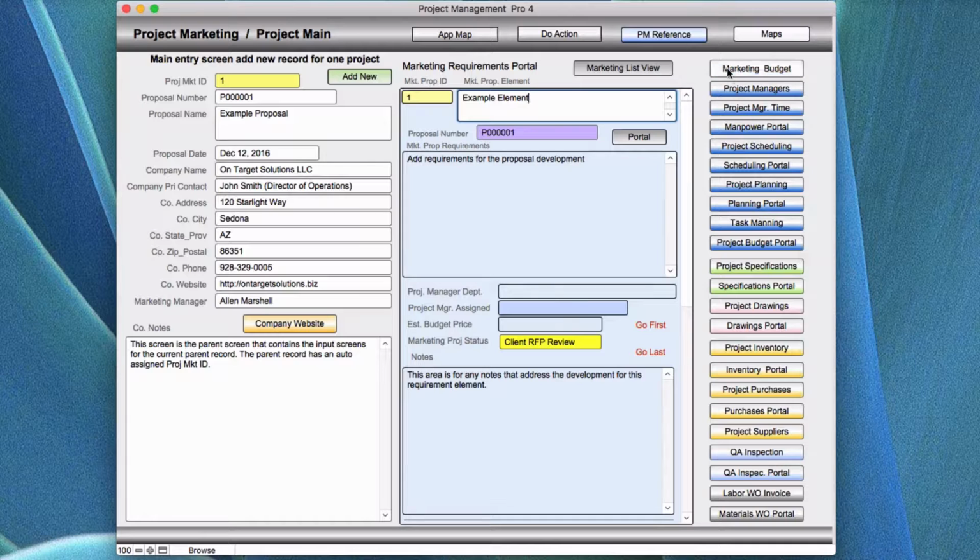Before you can actually start a marketing bid or do anything like that, you need to outline and get all the initial information required in order to be qualified to do the actual job. Many times what happens in a request for a quote is that people read through the entire document and they don't outline it. They do not take the information out of it and address each cost element or deliverable and how they have to provide that information back in their proposal to that company. If you miss more than one thing, chances are they're going to just throw your request out.